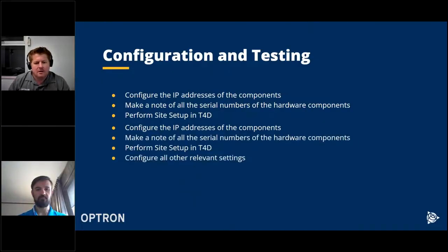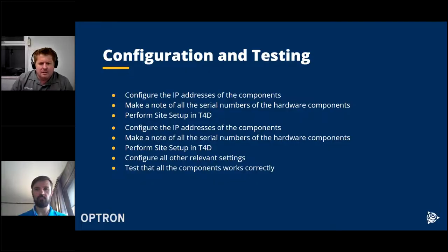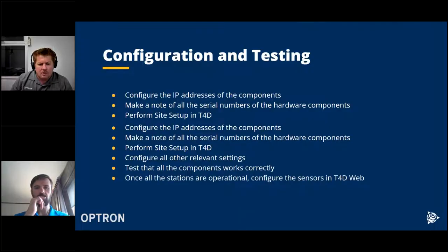Then we configure all the other relevant settings. So, for instance, the round scheduler and the alarms and all of that. Then we test all the components to see that it works properly. And then once all the stations are operational and everything is measuring in T4D server, only then will we carry on and configure the sensors in T4D web.